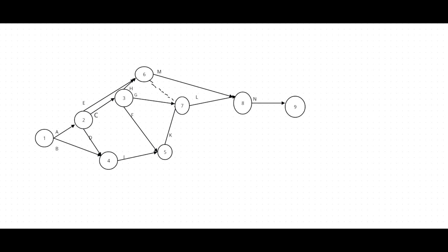Then you can get the same question. If you have any doubt whether your diagram is correct or wrong, do the reverse. Based on the diagram, just write down the question and compare it with the original question. If both tally, then you can see that.